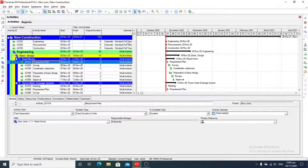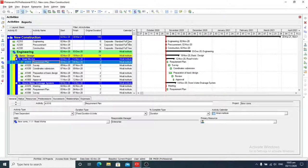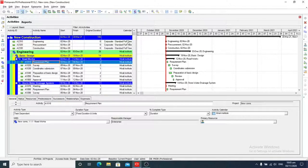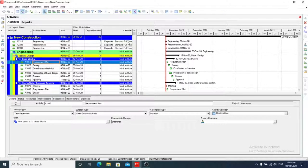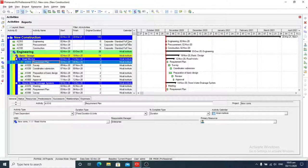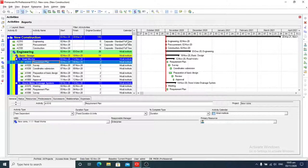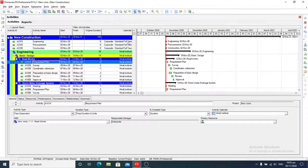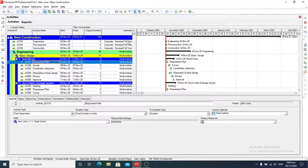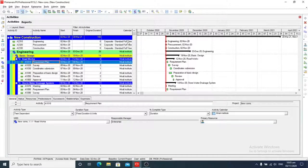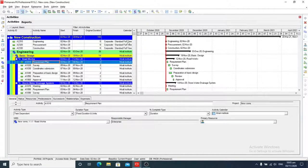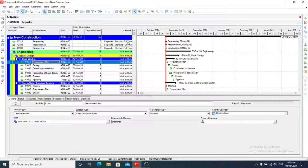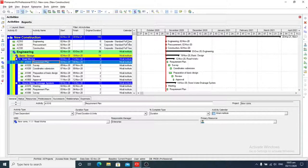Activity codes are sets of codes you create based on your organization's criteria that enable you to categorize activities into logical groups. Activity codes represent broad categories of information such as department, responsibilities, project manager, or location.